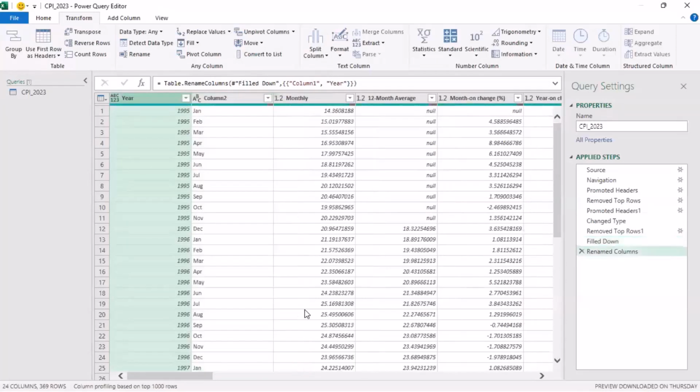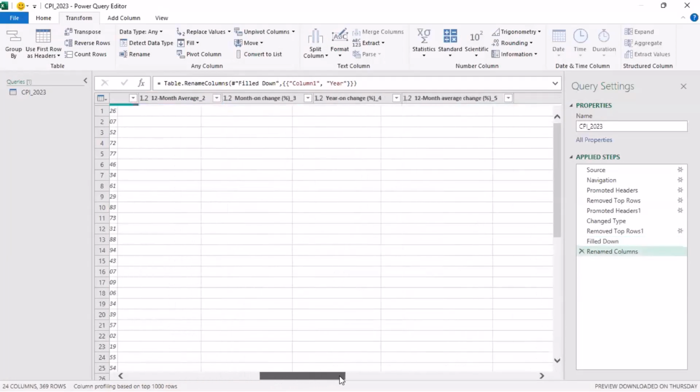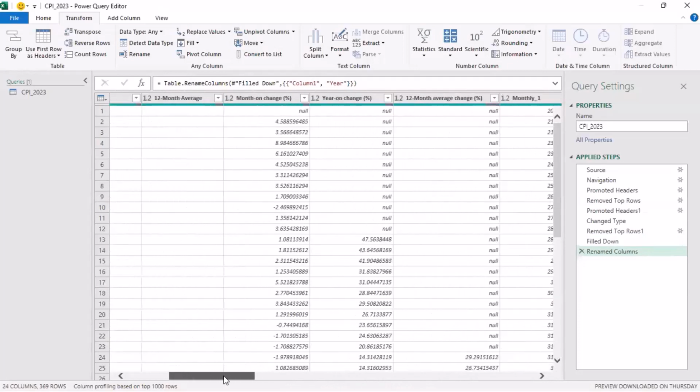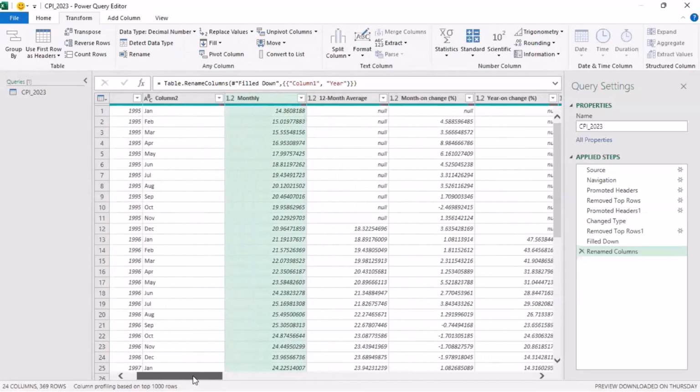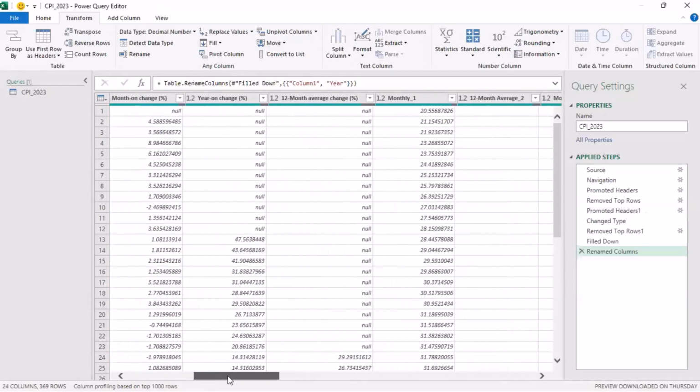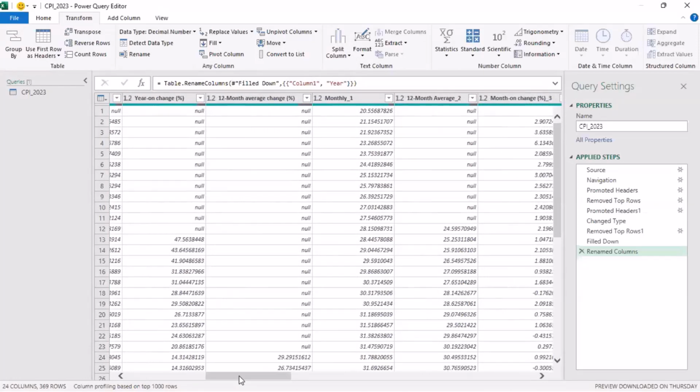Then the next one is, I ask myself, what are the informations that are useful to me? Because all of this information may not be useful for my analysis. Only the ones that are useful for the analysis are the ones that I will be focusing more on. On this side, on this monthly, up to where you have year on year, where you have this one. This is talking about CPI, inflation, including food. This including agricultural products. Then the other section is talking about inflation, less agricultural products. Now, the inflation that affects construction is not being influenced by agricultural products. So we are using the one that is less agricultural products, because oftentimes agricultural products can actually have